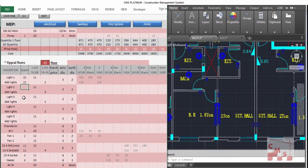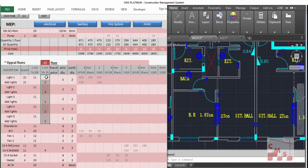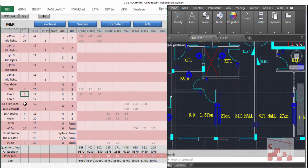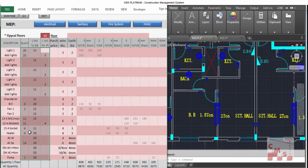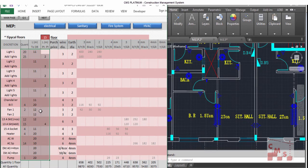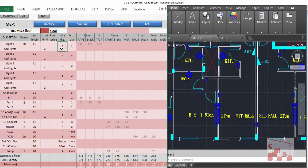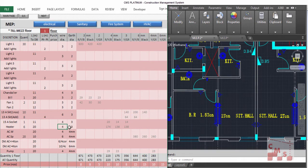The same is done for the typical floors. Insert the number of typical floors — in our case 15 — then insert the lights for each type as done for the previous floors: the length between the DB and the main light, and the length between lights. Do the same for fans, sockets, AC, and pumps. For the wire diameters, CMS considers 3mm and 2mm as earth wire for lights.